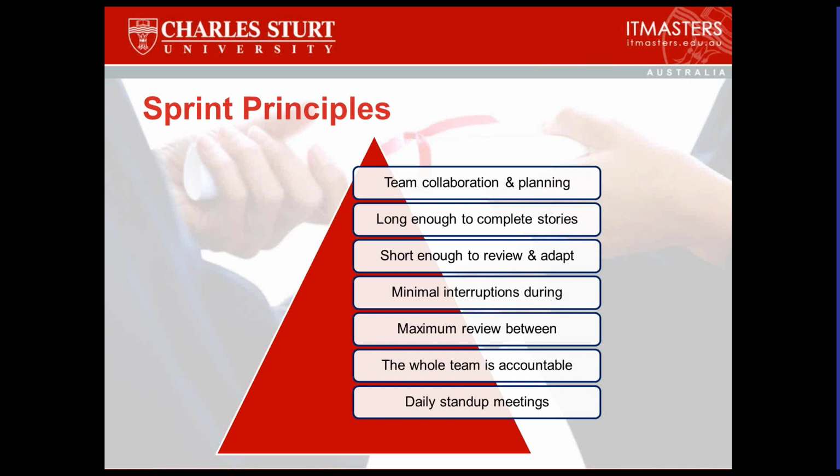And that's what the stand-up meetings are for. Mary says, look, someone was meant to do this testing of this stuff, and I can't go back and do this other stuff because I haven't got the testing results yet. Right. Who's listening to all of this? The Scrum Master. Scrum Master is saying, right, Fred, I'll make sure that Joe and whatever from tech support gets that sorted, and Mary, look, I'll make sure that we get someone else testing this stuff this afternoon so you can get that information. Whatever the answer is, that's the purpose of the stand-up meetings. Not to change what people are doing, but to fix the obstacles to productivity and continuity.